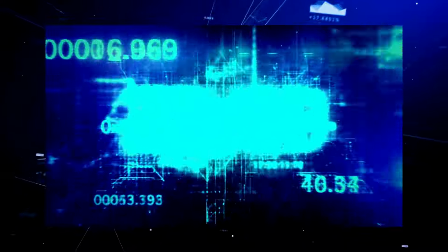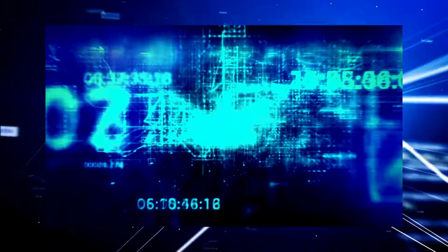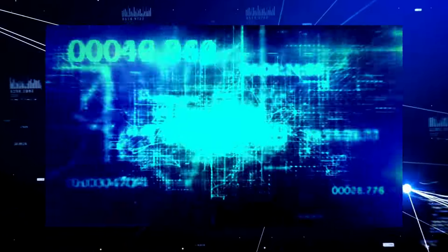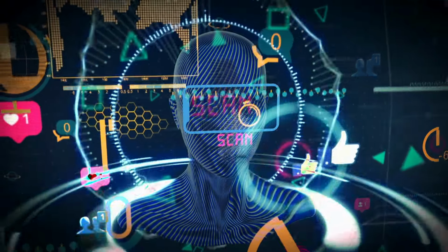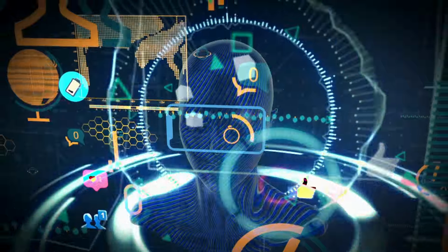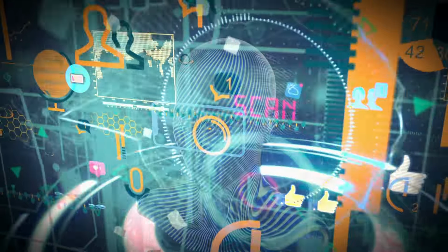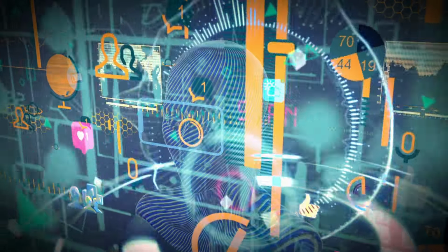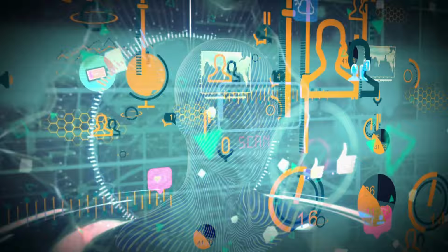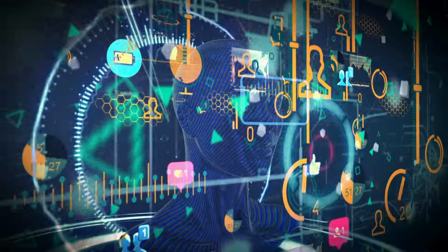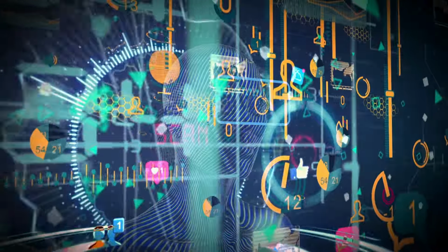Makes sense. So what are some of the things that can go wrong during this whole data migration process? Well, one common challenge is dealing with data that's inconsistent or even inaccurate in the old system. Oh yeah, dirty data. Exactly. So we need to establish clear procedures for cleaning and standardizing this data before it's migrated to Epic. So it's like cleaning out your closet before you move. You get rid of anything that's outdated, damaged, or doesn't fit anymore.